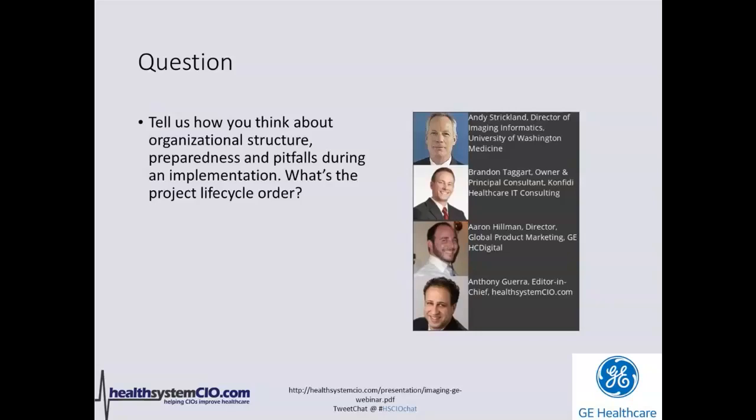Once you've moved into your implementation, you're still going to have some scope creep, and expect it, because that happens with every project. Just try to limit it. Otherwise, your go live date is going to continually move on you, and you really want to avoid that from happening. And then don't forget, one of the most important things that's sometimes forgotten is post go live optimization, and making sure to focus on that after the fact.